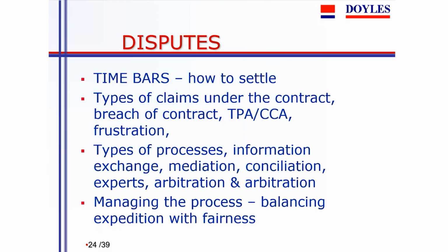The other aspect is, of course, that the security of payments legislation offers parties, particularly the contractor, the opportunity to pursue a claim and within approximately 2 months have it determined. It's a great benefit if it works well. Unfortunately, it doesn't always work well, in which case it messes up things, but it achieves a good settlement most times, and it's somewhat independent person coming in to determine what he thinks of the dispute between the parties, and it should be pursued.